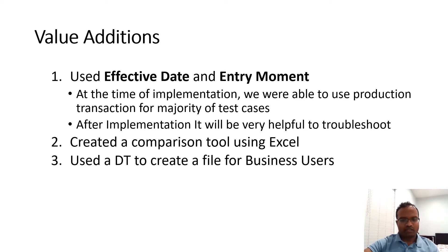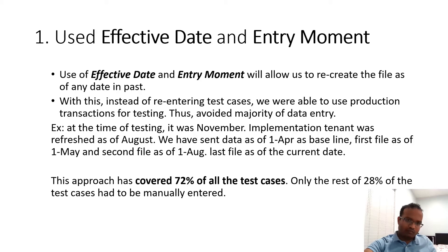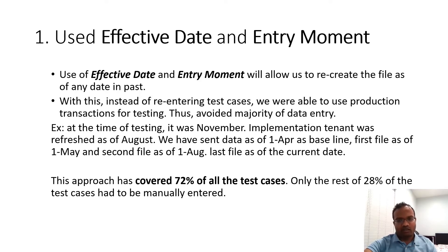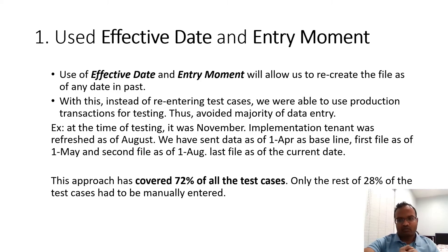Let's start with the first one — effective date and entry moments. The value addition I was able to achieve in this project is eliminating 72 percent of test cases. We didn't have to manually enter data; we were able to use production transactions themselves as test cases.